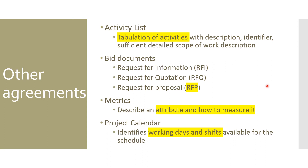The metrics artifact talks about different metrics to be evaluated in a project — for example, schedule variance and cost variance in predictive methods, or velocity and sprint goal achievement in agile. It describes the attribute you're going to measure, how you're going to measure it, and what formula or mathematics you'll use.